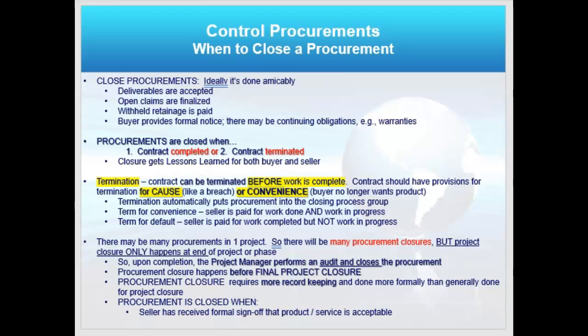Now, contracts are generally only terminated for cause in the commercial world, but you can write in for convenience. For the federal government, they can be terminated for cause or convenience, right? That really doesn't matter. Understand that they can be terminated for cause or convenience. The government can terminate a contract for convenience because what makes it a contract is there's an offer. Well, it's really my tax dollars.